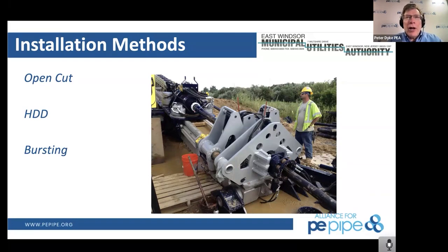So Richard, are you requiring that contractor to upload those data logger reports so that you guys can review them before that pipe string goes in the ground? Yes. And did you train your inspector on how to read those reports? Yes, he has been trained on it. Awesome. Well, that's an important skill.